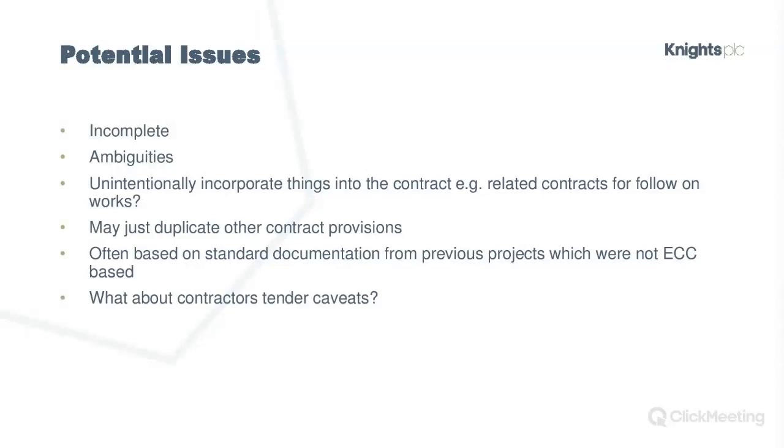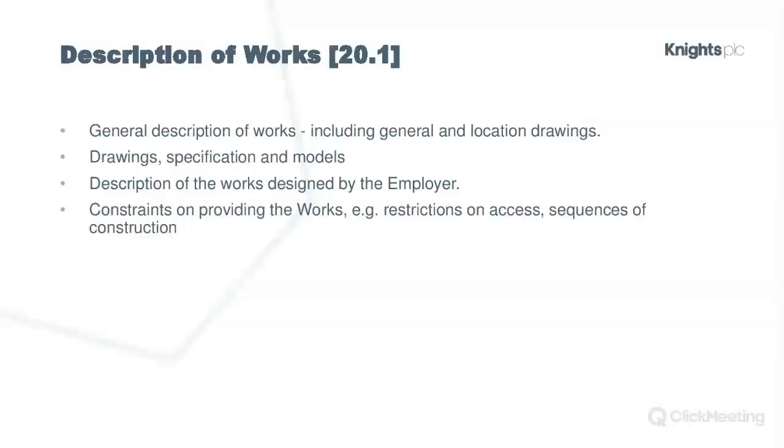And then when the contract's put together, none of those caveats are taken into account. So what happens there is that the paying party gets the benefit of a really nice, honed down price, but the contract risks aren't changed to take account of the fact that that honed down price reduces the risks that the party doing the work is carrying out.